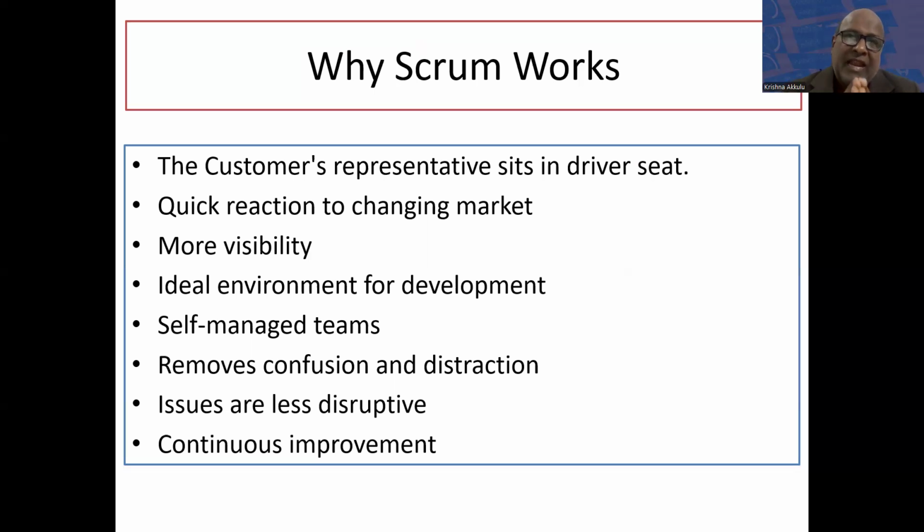Their goal is to deliver whatever we committed in the sprint and deliver bug-free code, which is called potentially shippable code. So they manage themselves in the team. How? If a developer finishes something early, he will see what work is pending. If testing work is pending, he will go and take up that task, or a documentation task. That's how self-managed teams work.